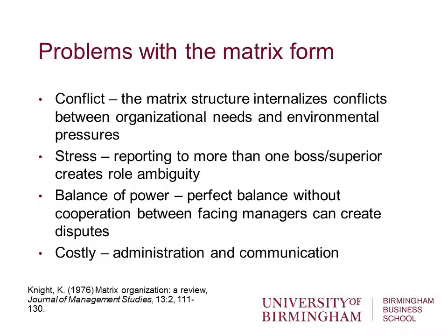There's a balance of power issue. Who's in charge? Is it the project manager, or is it the organisation, the functional manager, or the manager of a supplier, or the manager of a subcontractor? Who's in charge? Finally, the whole matrix structure is a very costly structural form. It's not very efficient, it's not very effective, but frankly it's the only way really in which projects can easily be delivered.